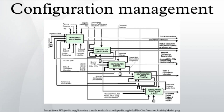CM programs and plans provide technical and administrative direction to the development and implementation of the procedures, functions, services, tools, processes, and resources required to successfully develop and support a complex system. During system development, CM allows program management to track requirements throughout the lifecycle through acceptance and operations and maintenance. As changes are inevitably made to the requirements and design, they must be approved and documented, creating an accurate record of the system status. Ideally, the CM process is applied throughout the system lifecycle.